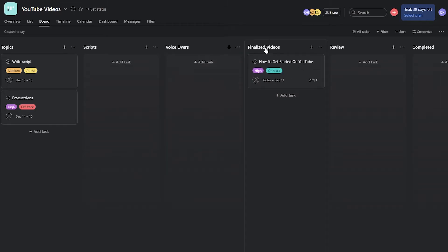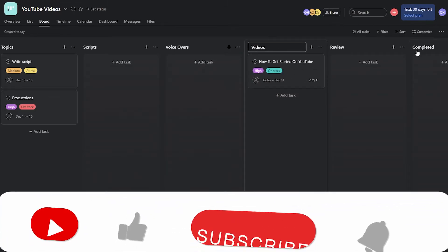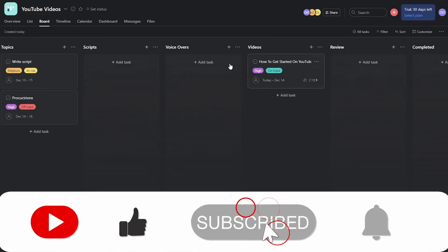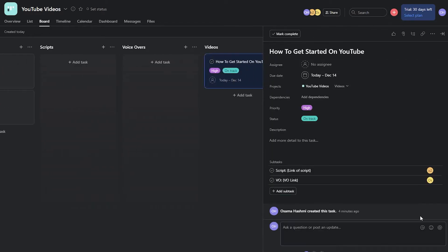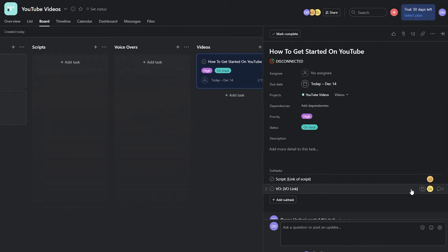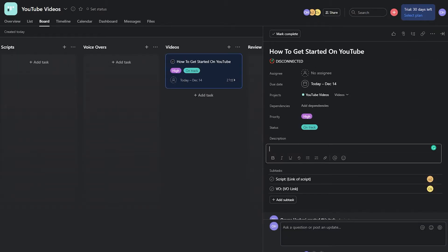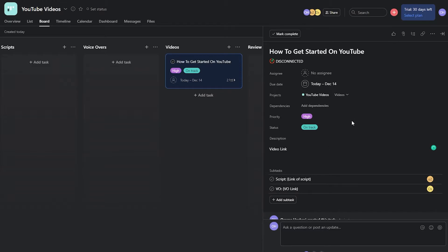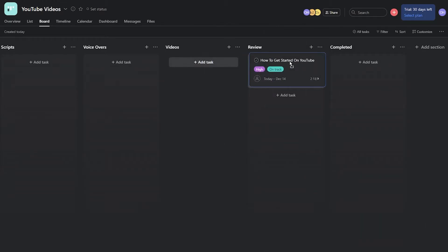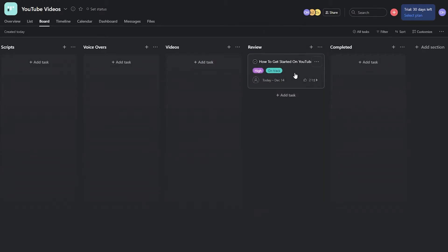The video editor takes the completed script and voiceover, creates the video, and adds the video link in the task description. Once done, the task gets moved to the Review column so it's ready for the project manager to check.